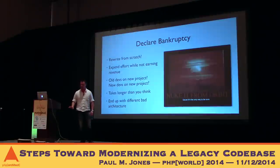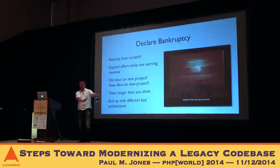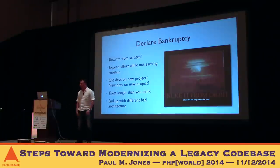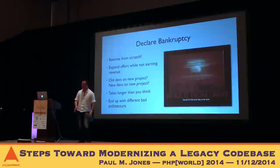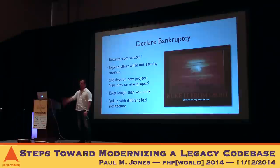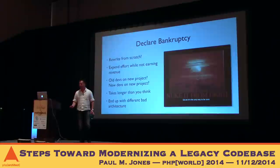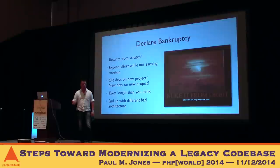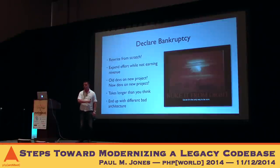Alternatively, put the new folks on the old system and have the existing developers do the rewrite, since they know the most about the system. Same problem — the new developers working on the old system don't know any of the history, don't know why the bugs are there, have to be trained up a lot. How do they get that information? They ask the existing developers. You've just halved your productivity again. And even if you're totally willing to deal with that cost and the knowledge transfer problem and the additional time, it's going to take a lot more time than you think it will.